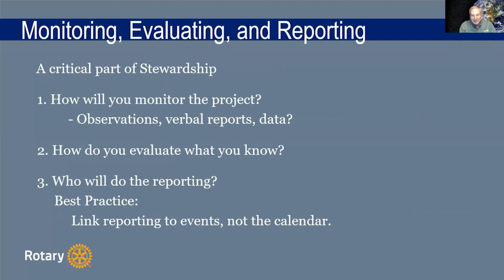And this best practice at the bottom: try to link your reporting to events, not to the calendar. Rotary International says you have 12 months after you get the first payment in order to write your first report. But what you want to do is put your report on phases of the project rather than on the calendar. So if 3 months in, you're going to order your primary pieces of equipment for whatever project it is, then at the end of that 3 months, you want to write a report and say, we